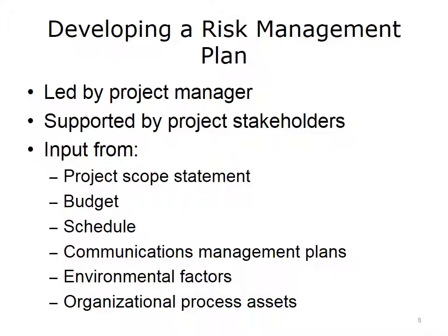Now we are going to delve a little more deeply into creating the project risk management plan. The project manager leads the plan with support from selected team members and other stakeholders with expertise in risk management. You will develop the plan with input from such project documents as the scope statement, the budget, schedule, and communications management plans. Consider environmental factors that may have a positive or negative influence on the project outcome, and review any applicable organizational materials, such as documentation that details an organization's typical risk management activities.